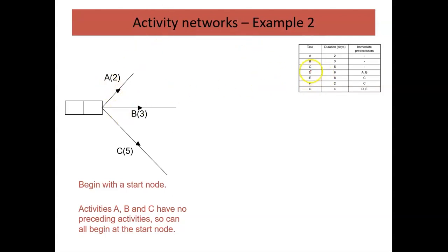And I suppose this is my problem, and this is why I highlighted the dummy activities bit to you. Look, D requires A and B to take place. Now, the temptation, I suppose, is to go around here, and then it comes in here, and I just have this box here. But you'll notice it breaks all my rules that I keep on talking about. You're not allowed to have 2 activities starting and ending in the same place in that way. So rather than do that, let me just rub out that dodgy bit of notation which I've put there.